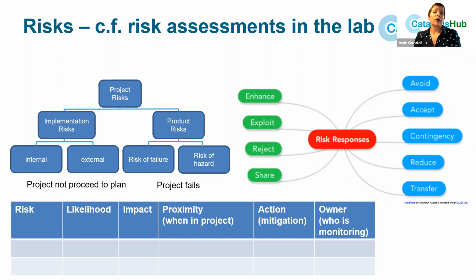Is it something that you are looking after as the project manager, or is it something that the person doing the research needs to do, or the person fulfilling the project, or is it something you need to escalate to the funder or the university? And then this risk register is in the plan and everybody agrees it and knows who has responsibility for what.